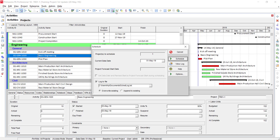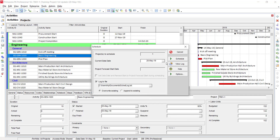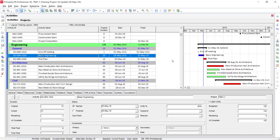Click the reschedule icon or press F9. I am assuming this project is being scheduled on 20th May. Click Schedule, and you can see the data date has shifted. The blue line indicates the progressed portion of the activity, and the red color shows it is still pending.